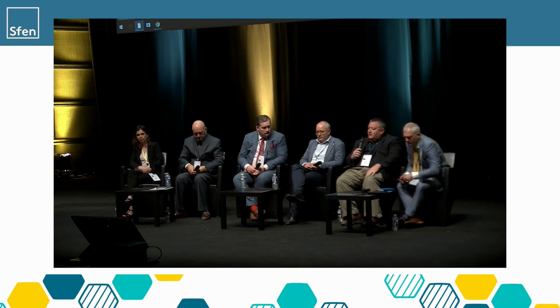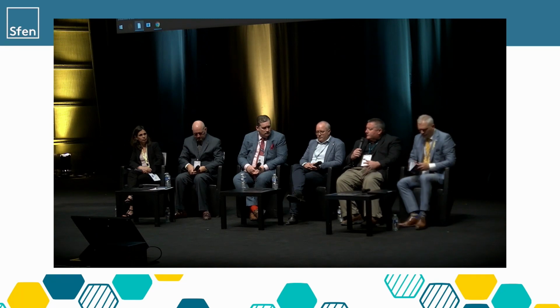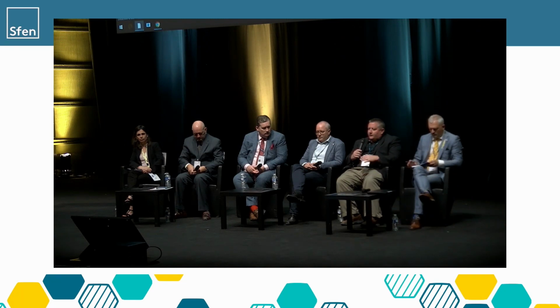So far, it's all been headed that way, to the point even that before we submitted the application, a fatal flaw review was offered by the NRC to see if we had missed anything fatal. We didn't. There were some indirect comments about detail here, detail there, but that was kind of like the teacher looking at your paper before you submitted it. So when we actually did submit it, they had an idea of what's coming and who to send it to, so that they could more efficiently assign reviewers.